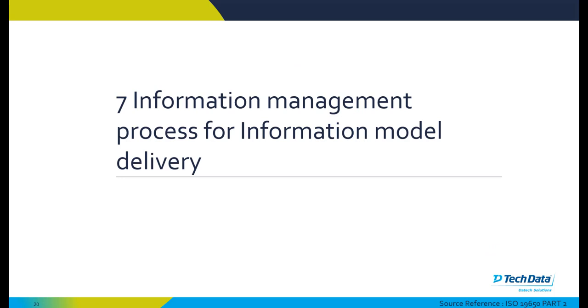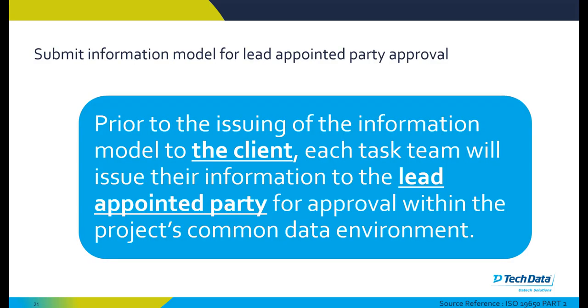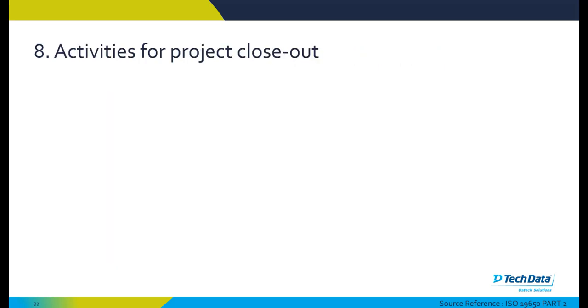At the information management process for information model delivery, each team should submit information model for the lead appointed party approval. Prior to the issuing of the information model to the client, each task team will issue the information to the lead appointed party for approval within the project's common data environment.